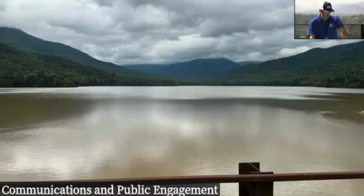The other thing that I want to note is we have EPA and FEMA officials on site. They're not only providing resources for this recovery effort, but they're providing technical assistance on how we can treat this reservoir and what we can do to get water back to this community. So again, we have those technical experts with us on site. And with those technical experts, we're working on contingency plans to deliver non-potable water to the distribution system while we continue to restore our treatment capacity. So we are looking at every way we can to get water into our distribution system. But I'll remind everybody, none of that can happen until the distribution system is repaired. So these things are happening concurrently. What we hope to do is to be in a position to begin to pressurize the system once the reconstruction of the bypass line is completed.